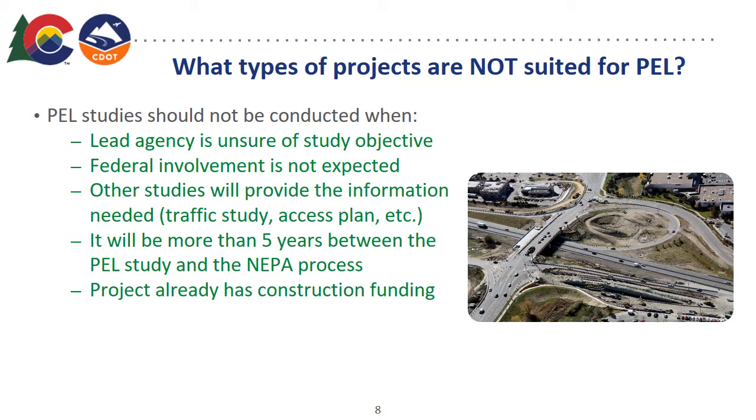The timing of NEPA is also a consideration. If a NEPA process is unlikely to begin on any part of the PEL study area within 5 years of the completion of the PEL study, agencies should probably wait to conduct the PEL study or other study. On the flip side, if transportation problems have been identified and construction funding has been committed, a project shouldn't do a PEL study. They should just initiate the NEPA process.